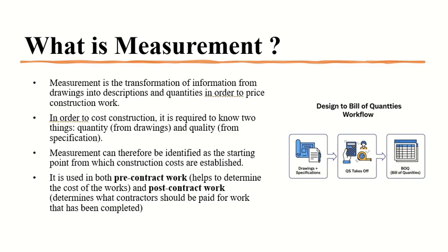So pre-contract is so I can provide them information to give me their quotations. Otherwise, they will not be able to give their quotations, or even if they give, they will not be accurate. You will have problems later on, conflicts later on. So pre-contract measurements help to find out the work required. And then we have post-contract.